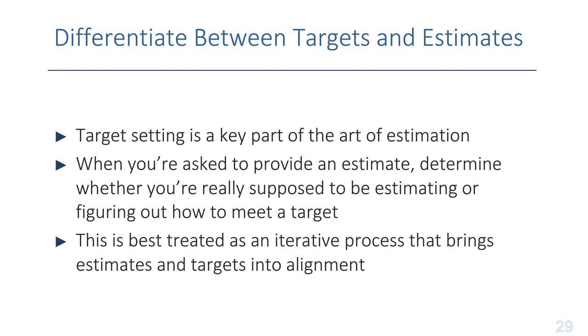And if the estimation activity says that target's not going to be achievable, then we need to have some iterative discussions with the business to figure out, well, what can we achieve and how should we revise our target, or is it even a good business idea to aim for this target. Maybe if there's too much of a gap between the estimate and the target, we just should regroup and aim at some completely different target, which is to say not do that particular project.